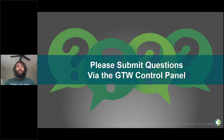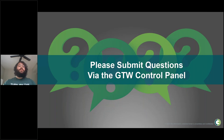How long does it take to get started with AWP? You can take a few days to say you're getting started, but ultimately the entire process of kicking off your AWP program and getting all the pieces in place is going to be about six to 12 months — half a year to a year. That might sound like a surprising figure, but the goal is to put in the work needed up front so that by the end of that time range, you've done everything correctly and you're confident to start rolling it out to your project and team.